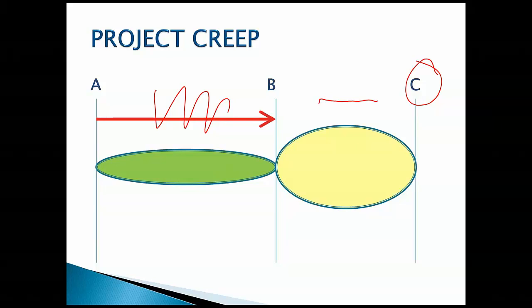If I'm working with a contractor and their slab is slipping, right? Generally, one of the first things that happens, they'll say, oh, we'll be able to make it up later. And they'll just take time from other activities that are scheduled later, or they'll do some resequencing to try to bring it back. And so as a schedule reviewer, I want to know if that's what's happening. I go back to the old saying, if you can't hit what you're telling me you're going to do next month, then I can have very little reliance or any kind of confidence in a date that you're giving me that's a year out. So I want to know that up front, right?